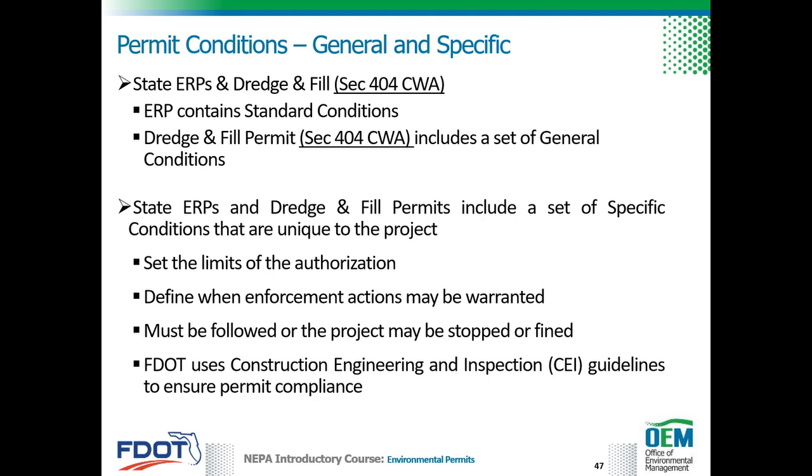Specific conditions must be followed by FDOT and the contractor, or the project may be stopped or fined. Generally, FDOT uses Construction Engineering and Inspection, or CEI, guidelines to ensure permit compliance. If any conditions of the permit are not acceptable, the issue must be resolved prior to the initiation of any work.